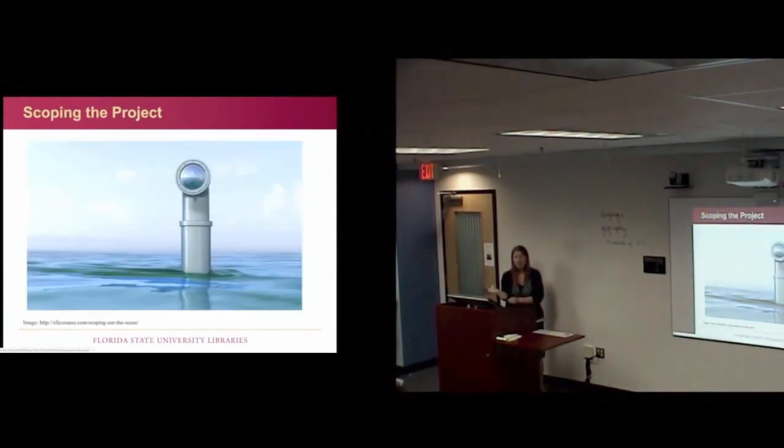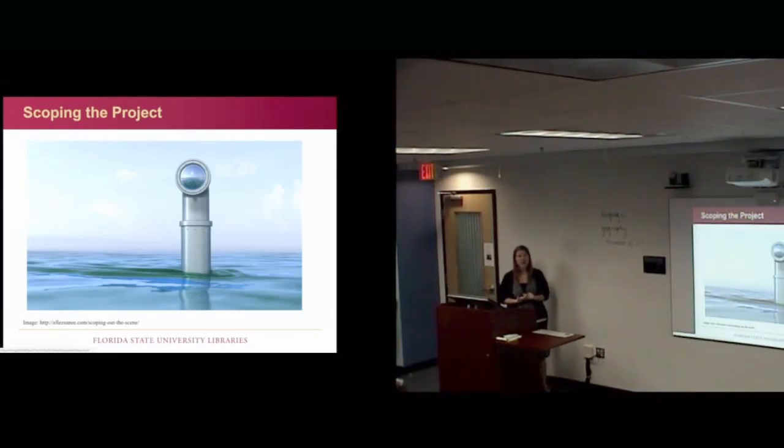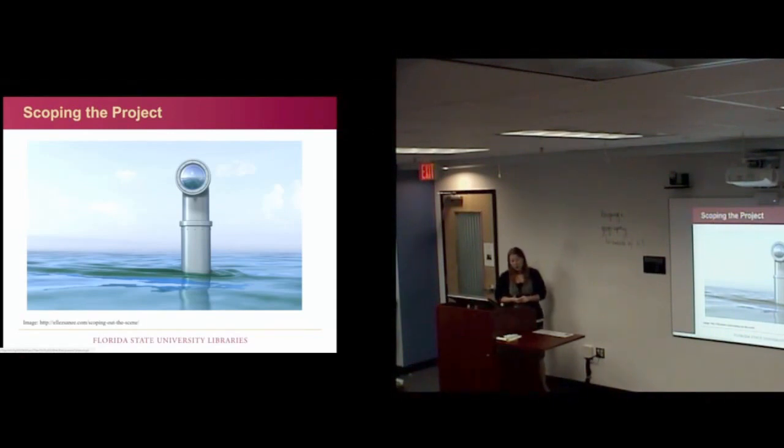Once we have selected what project we're going to move forward with, we go into the scoping of the project, which is where we do a lot of work. So here we're looking to get lots of information gathered about what this project's going to look like. We're looking at the goal of the project. What is the ultimate thing we want to have when we get to the end? Under that, we think about deliverables. What are all the different pieces that are going to make that goal a reality towards the end of the project? And to get to that deliverable, what are all the tasks that are required to be done in order to get to them? What are the costs involved? And then what sort of deadline are we working under to get all of that done?